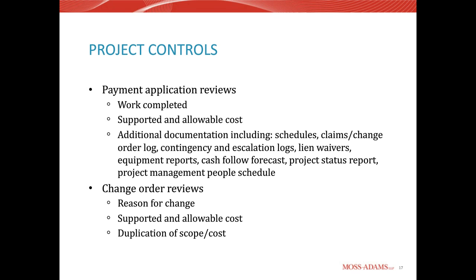I know on some projects, due to time or volume of documentation, it may seem impractical to receive actual cost support for everything that's being submitted, but you should be reviewing that on a monthly basis, whether that's time cards, receipts, invoices, anything of that nature. You want to make sure that you're reviewing that every month so that if you see anything that seems unallowable per the contract or seems to be not aligning properly with the scope, you can catch that in real time rather than waiting until the end of the project to try and address those types of items.